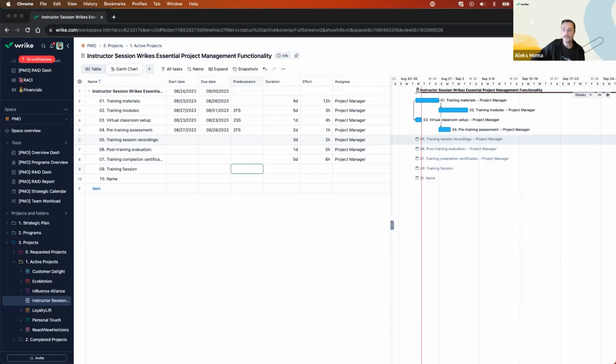So this is going to get interesting. Training session recordings can only be done after the training session is complete. So let's have a look at that. That's a 9, finish to start dependency. Yep, it's going to look a little bit weird here. Post-training evaluation, again, 9 finish to start. Training completion and certificates will probably be kicked off around the same time as the training modules having been done or worked on. So let's make that a 2 finish to start.